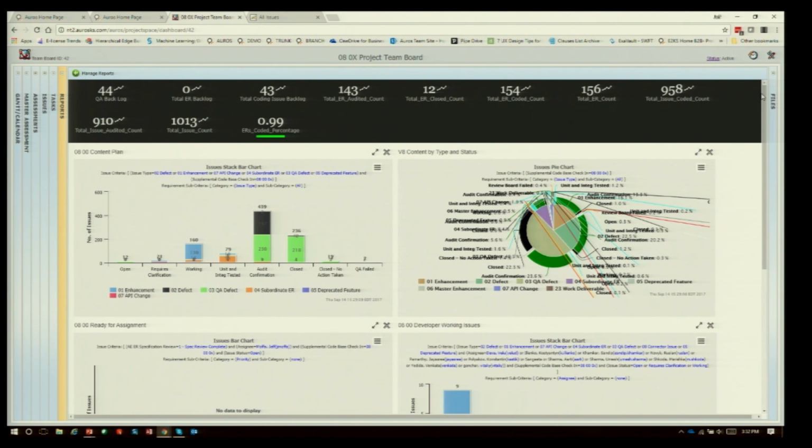The percent completion for this release, you would expect it to be 100%. It's 99.99%. It's basically complete. And that's green based on the phase of engineering that we're in. We're in the RC1 phase. 99% is an acceptable level. Okay? So you can create these KPIs, and they're completely real time. Your people are out doing assessments. You don't have to say, how much have you done in your assessment?